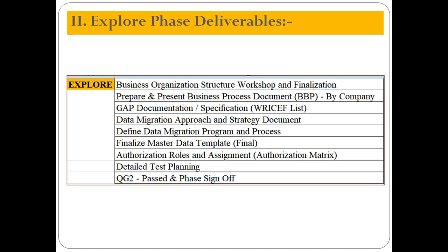Okay, what is the explore phase? In the explore phase we have to demonstrate the fit to standard workshop. What is a fit to standard workshop? As a consultant, we identify the list of processes which the client currently follows and which we need to implement, and we have identified these as the BPML processes. Now we are going to prepare the fit to standard workshop.